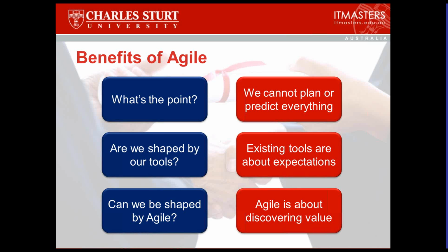So we've got a question here from William, I think, saying Agile development would need to be quite different from traditional contracts. How does an Agile contract work? It does work very differently. William, it does certainly cover very different things, because what's the point of a contract? Typically, it is the mitigation of risk, or rather the clarification of the assignment of risk. That's the reason why we write things down, because we want to know who is taking the risk for the mistake. That's the core purpose of most contracts in this regard.